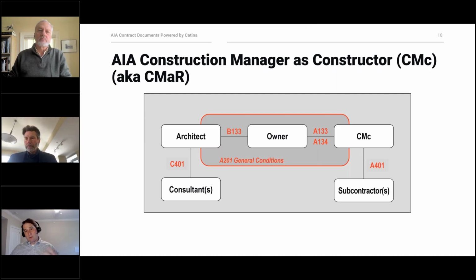And so instead of going through a design bid build scenario where you have full design, then you bid it, now the contractor's on board. The contractor who's ultimately going to be responsible for building the project is there throughout the entire design process, or at least significant portions of the design process, depending on how the timing of the contracts work out.